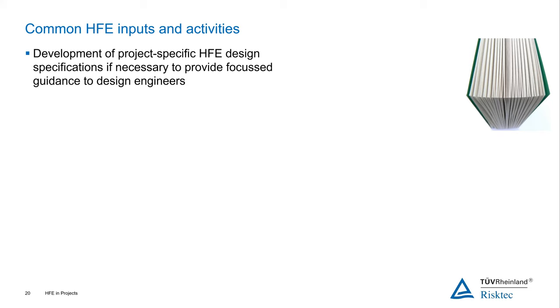And one might be that, in addition to talking about specific ergonomic standards and human factor standards, there might be a need to actually produce a project specific HFE design specification. The reason for that would be it will be a one-stop shop for the design engineer. So you could focus it particularly on aspects of the design that they need to focus on, so you don't have to go and look at multiple standards from the shelf. You might have one set of design specifications, and they can use that as they're developing the design as a go-to to see what they need to be doing.